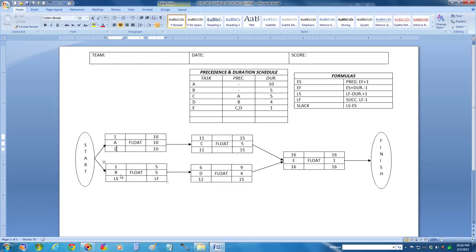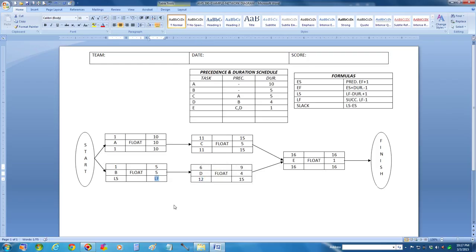Let's solve finally for B on a backward pass. Its latest finish time is going to be its successor's latest start time, which is activity D's latest start time of 12, minus 1, which is 11. So the latest start time is 11 minus 5, which is 6, plus 1, which is 7.